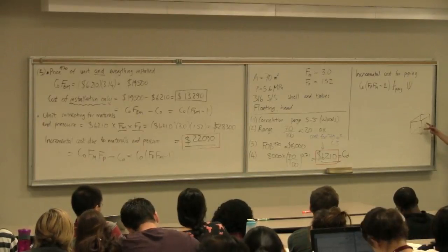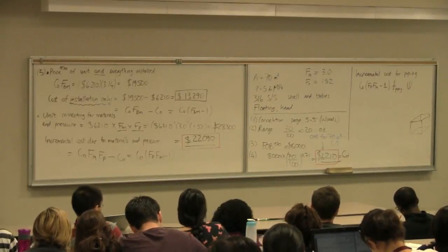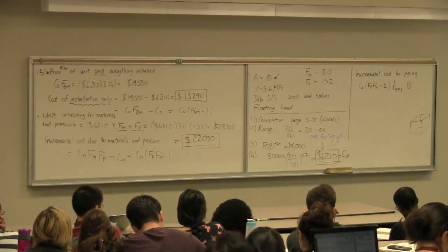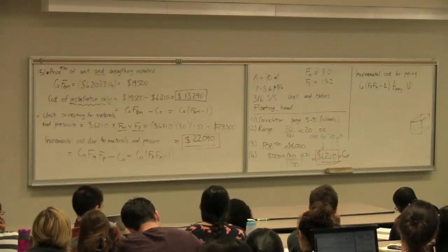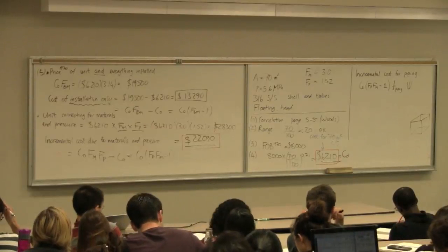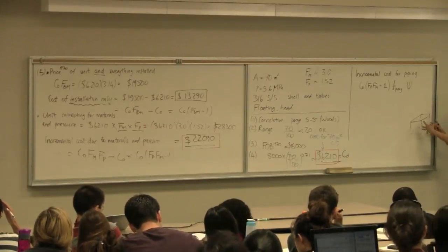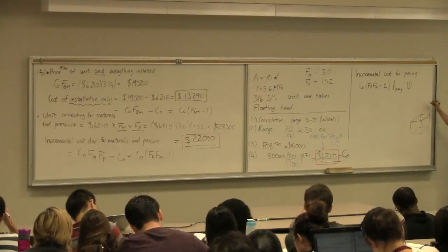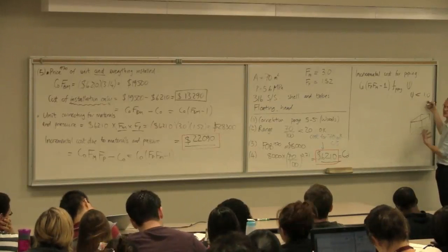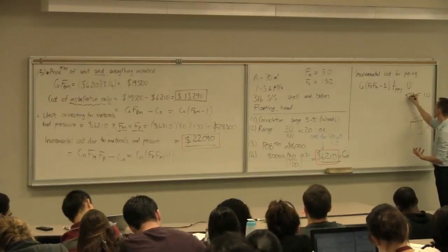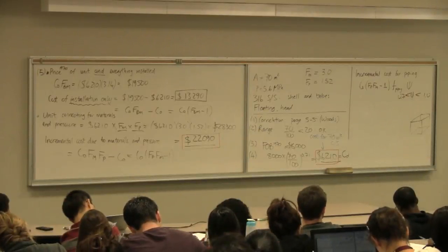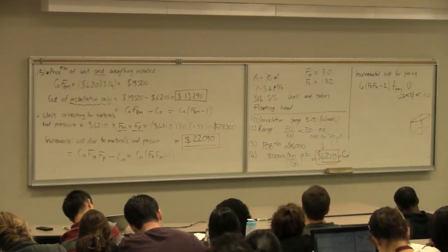You could say, well, 100% of the piping needs to be. But then you can also recognize, well, around this heat exchanger, not all of the piping is related to the materials flowing through the 316. There may be some piping that's just conduits. There may be some piping just to take drain and rain water away. So not 100% of the piping in this bare module is due to this incremental cost. So you can pick a value of psi anywhere between 1, in other words, you're deciding to replace 100% of the piping in the bare module, or a value of 0.7. Anywhere in between that number would be a reasonable percentage of piping to be switched out to the highest spec unit.